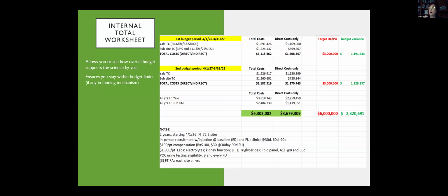In terms of the PI and co-Is, there are rules about that. And correct me if I'm wrong, Patty, but it's like 25%, right? You can increase someone's effort, but you cannot reduce it more than 25%. So that seems like, oh, that's not so bad. But when they're on a small amount, that's a big deal. So you just have to be sure.